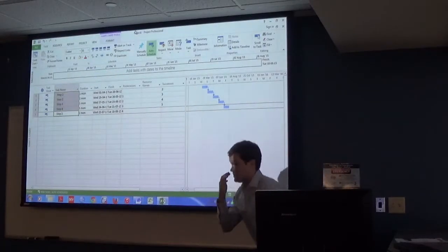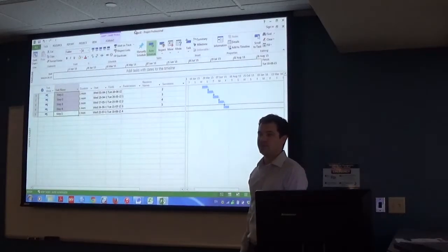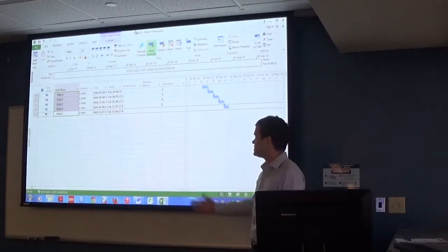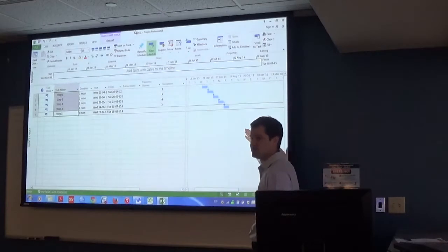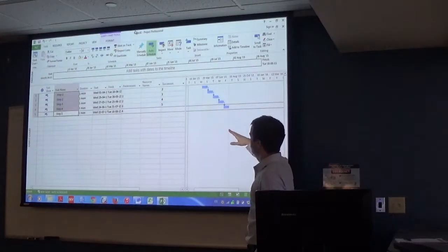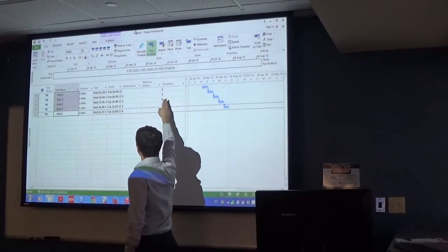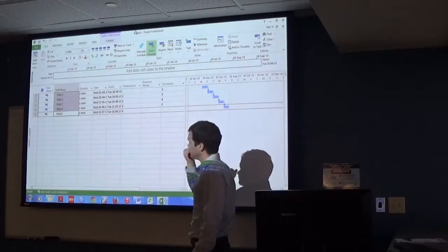Steps are usually not going one after the other, right? Like I can't take my second step before I take my first. That's the assumption the program makes. It says I can't take step 2 until I take step 1, and I can't take step 3 until I take step 2. So it's gone through and linked them and shown what the successors and the predecessors are, what had to occur before that in order for that to happen.